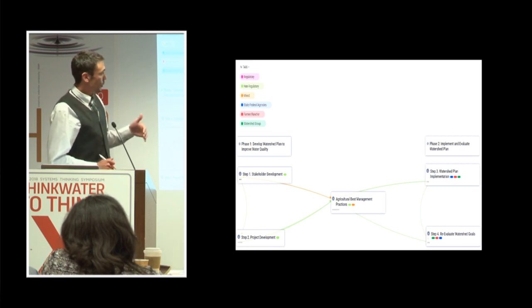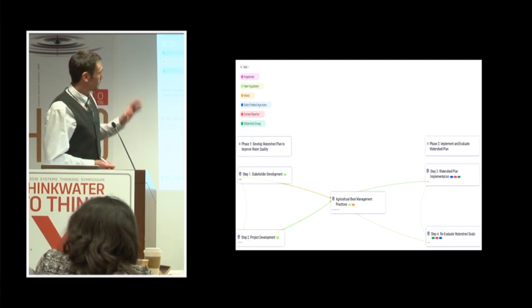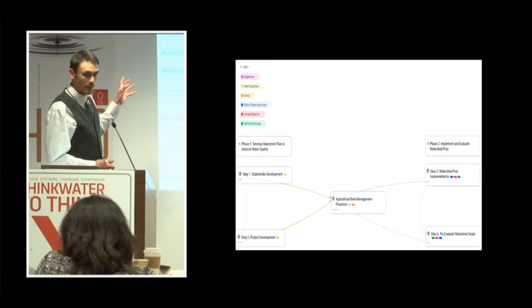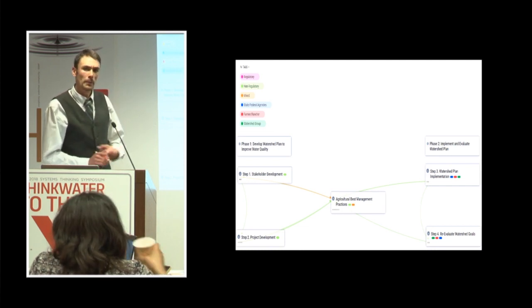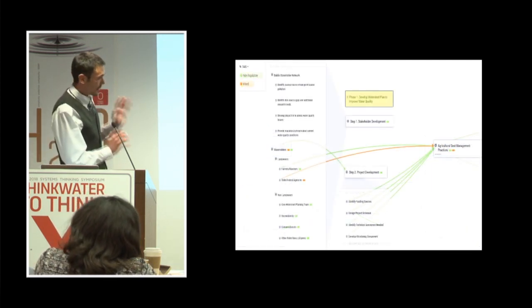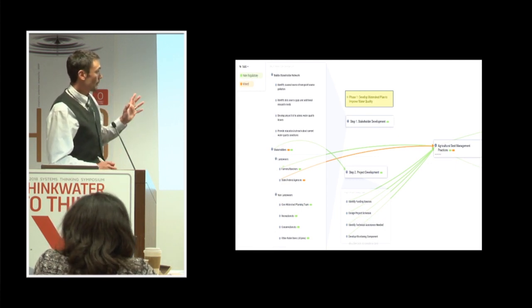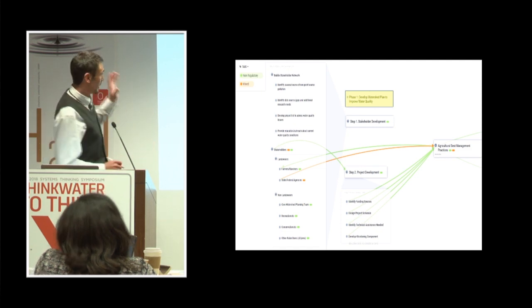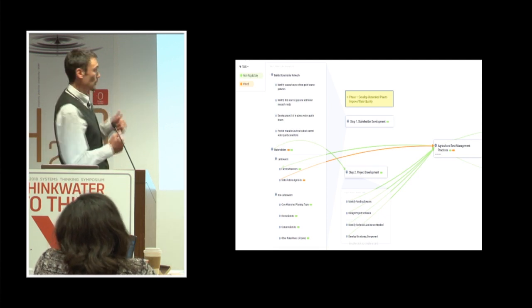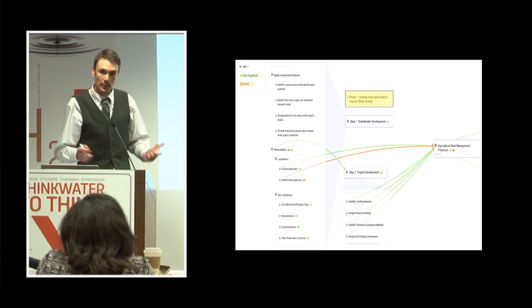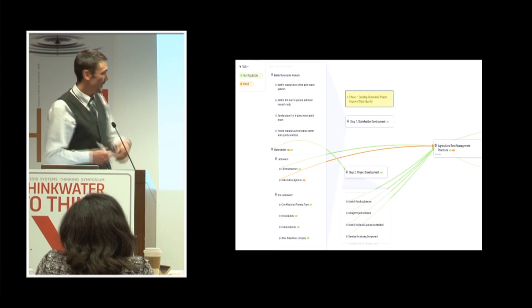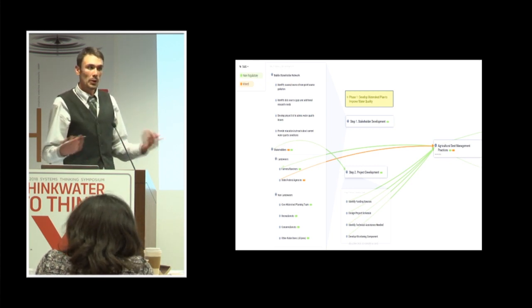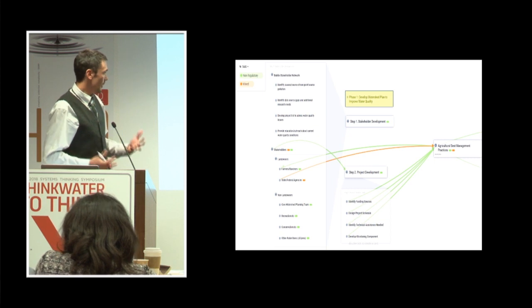And then our stakeholder group broke down into the general watershed group, farmers and ranchers and state and federal agencies. The watershed group included farmers and ranchers and some folks from the federal agencies, but it also included kind of small landowners or just general interested citizens, non-profits or NGOs as well. So just focusing on phase one of the watershed plan, so this is where we're at. If you look first at the first step, critical to develop your stakeholder network. So this mapping was very helpful. And first, what we did was we identified attributes that we needed to obtain from our stakeholder group. Things like, who's going to help us identify the causes and sources of pollution? Who's going to help us identify data? Who do we need at the table? Who's going to help us with the financial assistance and how do we persuade them to come to our meetings? And then finally we needed to continue that education and outreach, but also look for other people who could fill in our knowledge gaps.